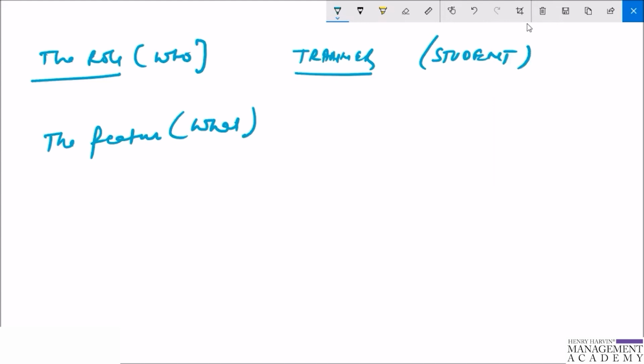The details of how to write the code will come later, when the development team does the tasking. For this section, you just describe what the user wants, and the user story should be written from the perspective of the user who will benefit from the function, not from the perspective of the developer who is going to code it. So that is a very important section.